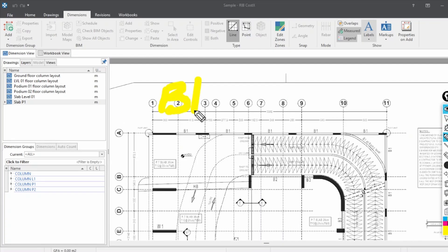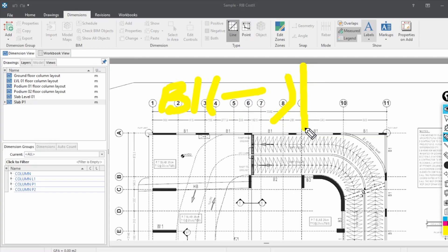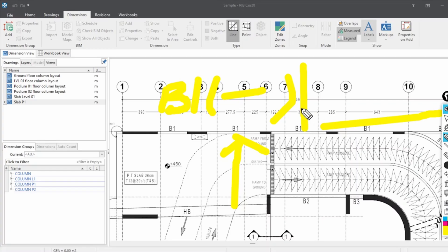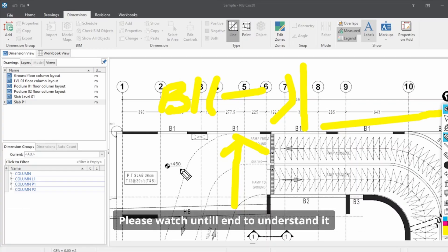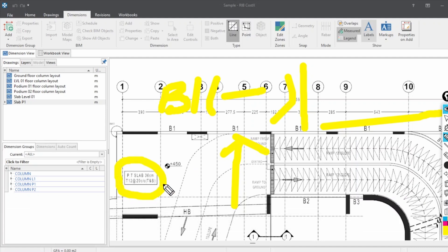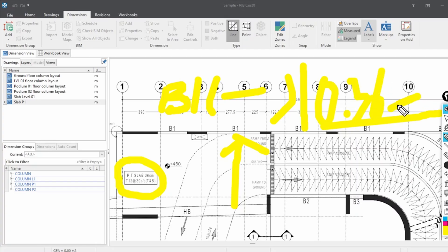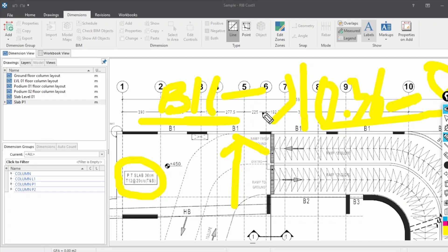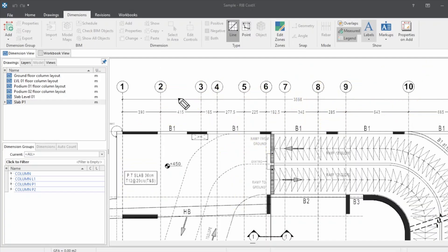I'll tell you how to write the description. First, write the name of the beam followed by the dimensions of the beam. Then comes the important point: we have to mention the thickness of the slab. I'll tell you later why the thickness will be useful for our calculation. Here for this beam we have the thickness is 36 centimeter, which means 0.36. You can use underscore, and we have to write the thickness of the slab on the other side of the beam. Here we don't have any slab, so we can write zero.